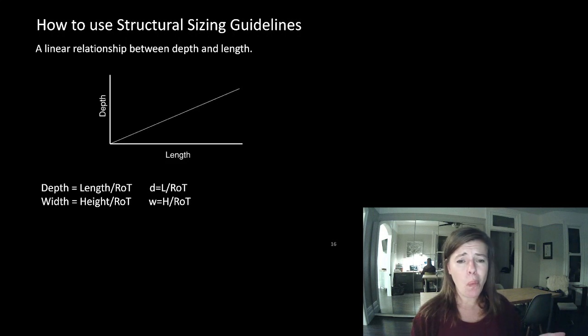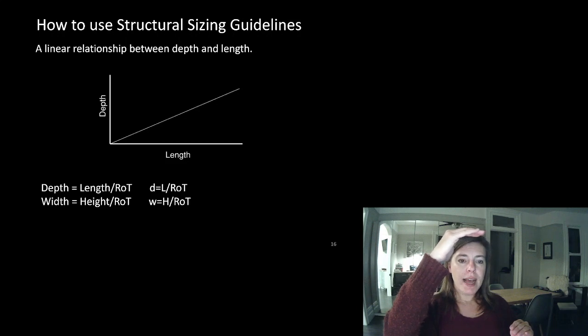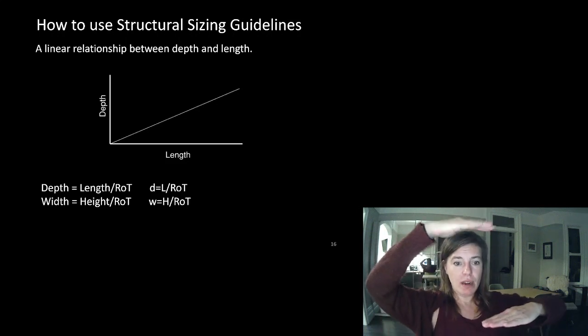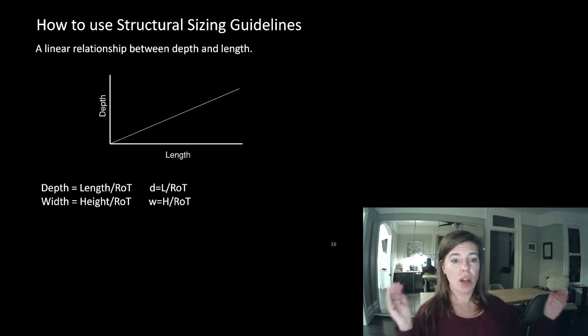Now you're wondering, why do I care what I put on my drawings very early on? Well, if you have a building that has a maximum height of, let's say, not 10 stories, but so many meters, you've got a hard limit on how tall this building could be because the city has said nothing taller than that can be built.